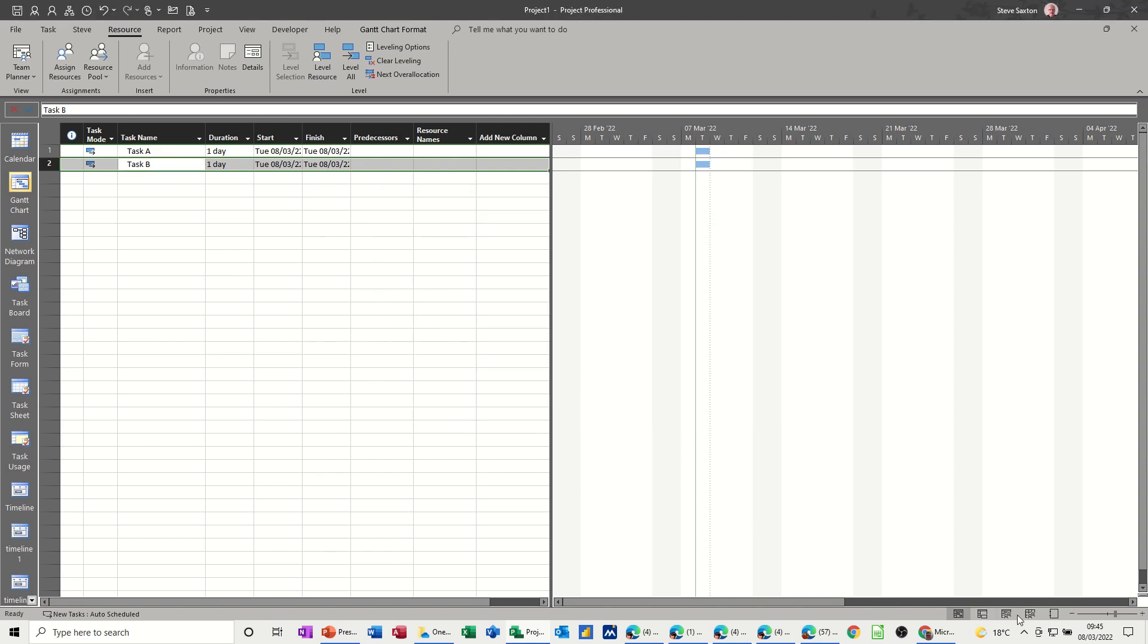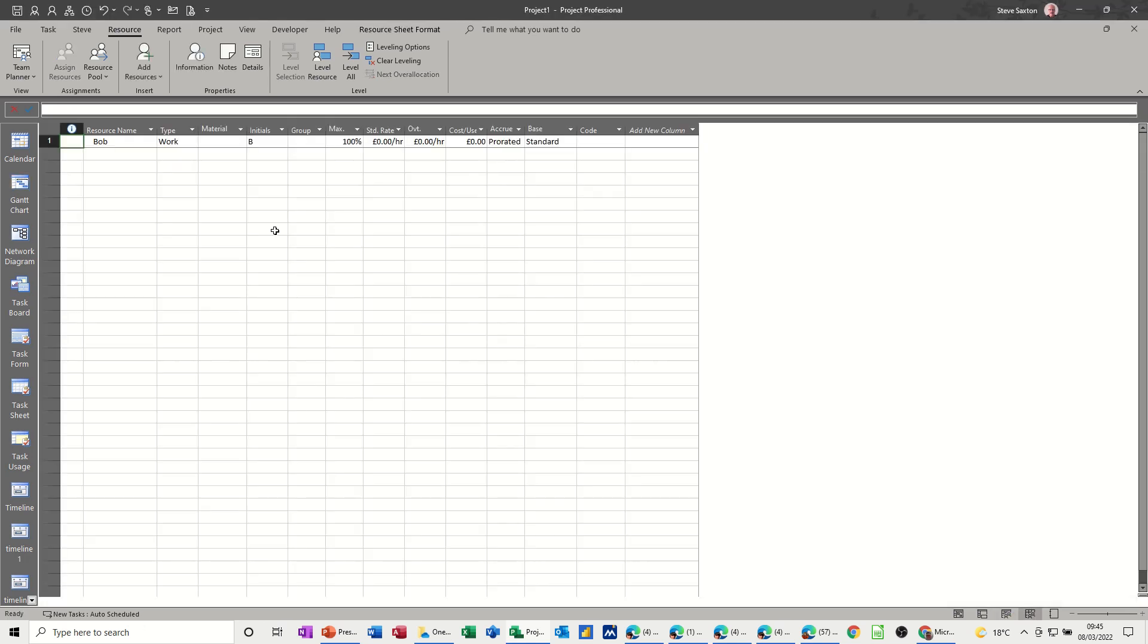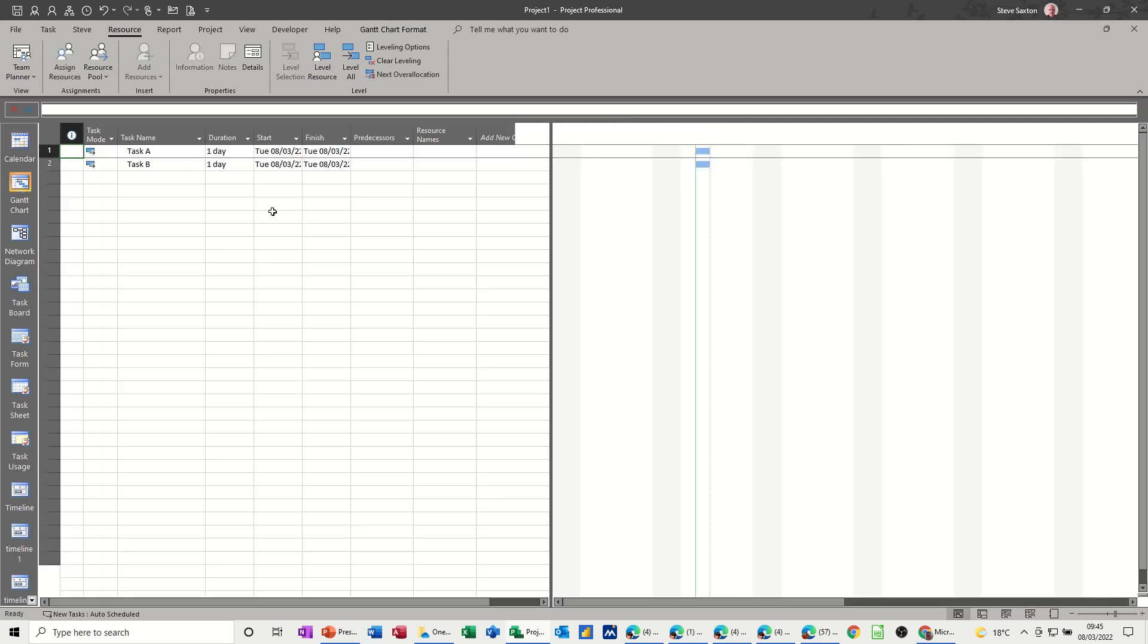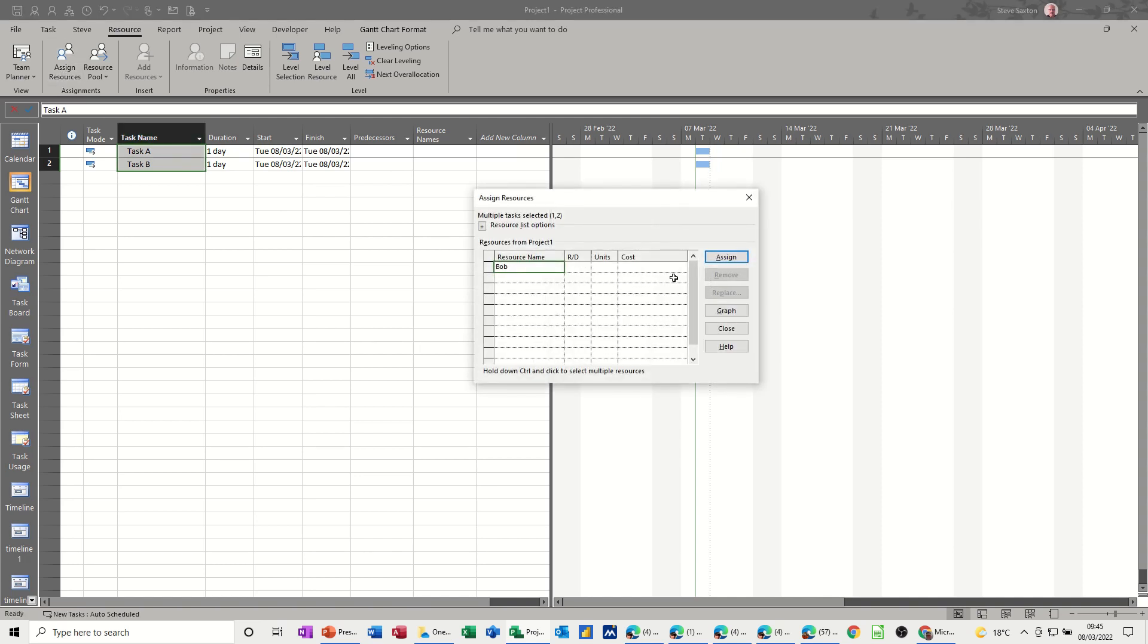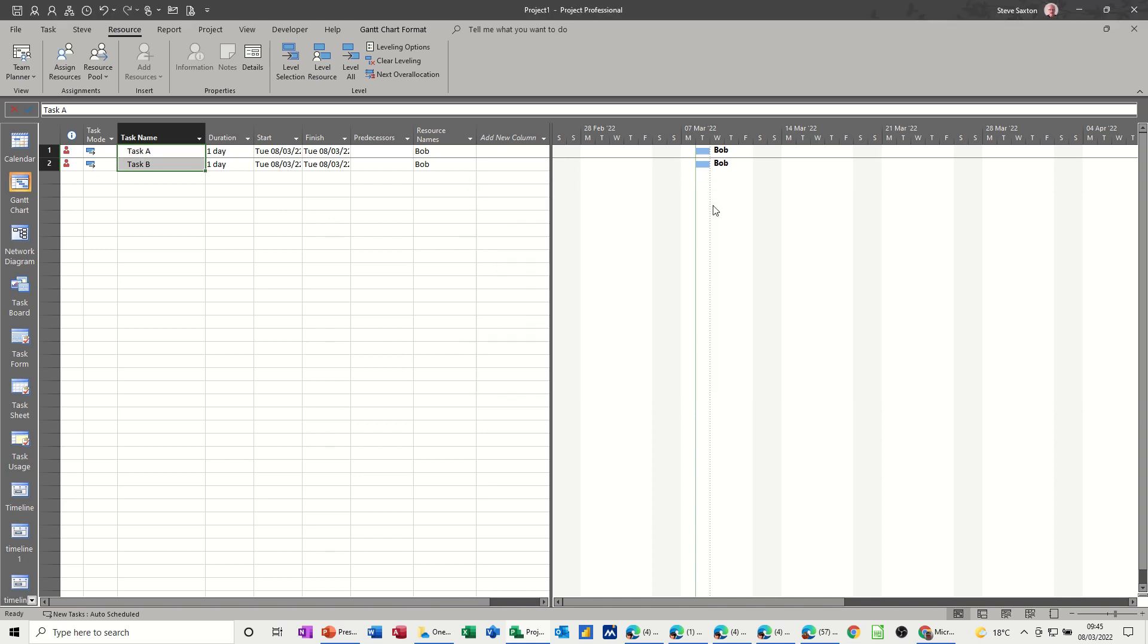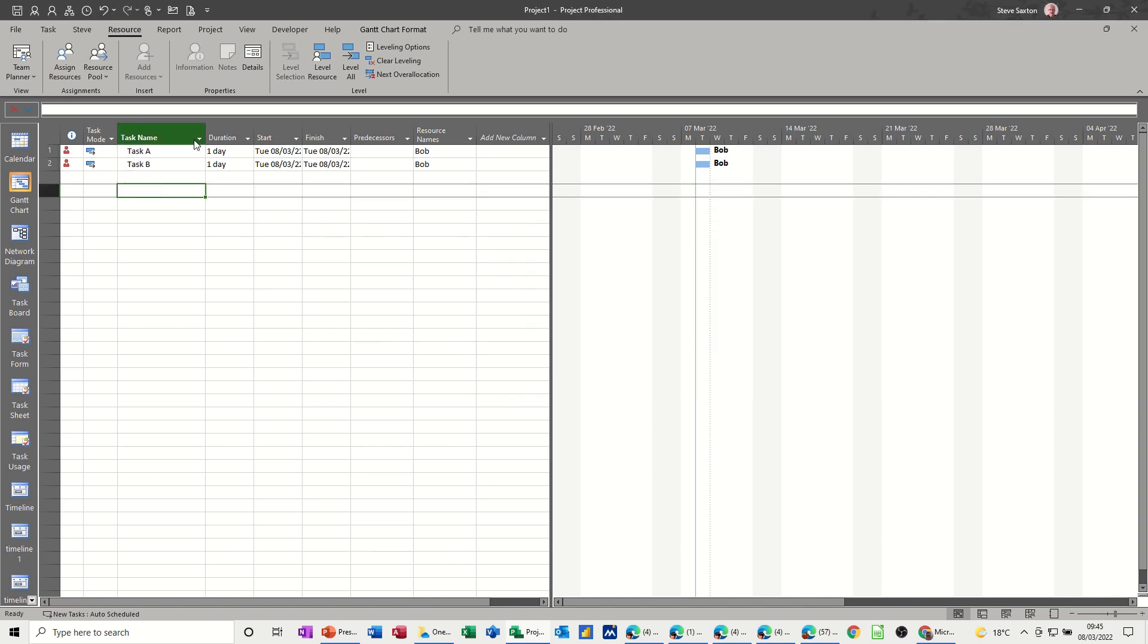Now if I create a resource, or I've already created one, Bob, if I add Bob to task A and B, so I'll highlight them both, assign resources and assign Bob. So Bob is over allocated. So one of the tools that you have in Microsoft Project is resource levelling, which I've just pointed out there.